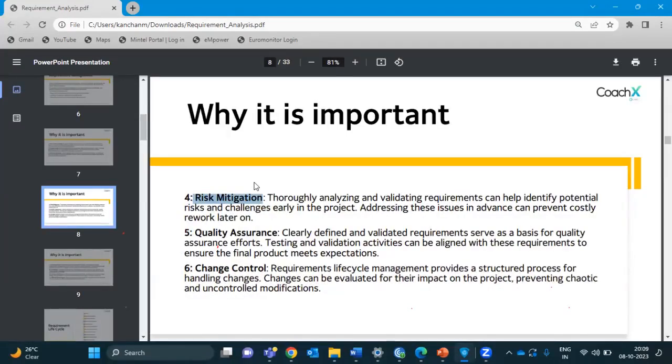For example, I am developing 5 features and I would need a testing team in place, but I do not have anyone currently. So I'll start my project work where the developers are developing features A, B, C, D, E, and I would also start hiring or looking for the testing team. That's a resource risk.